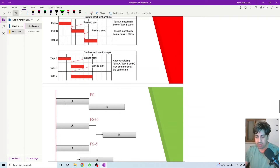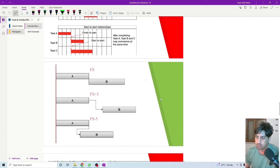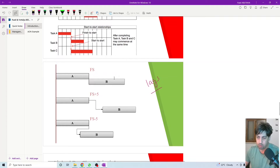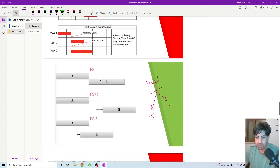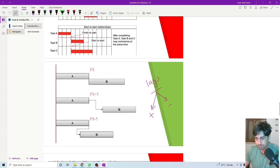If we have something we call lags, we might have lags with these types of relationship. The lags can be positive or negative. So what is a lag? If we have a finish-to-start relationship between activity A and activity B, they might also have finish-to-start plus five days. It means that five days after the end of activity A, activity B will start.